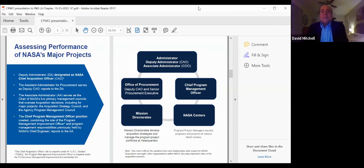For sure. And this is very early. It's before we've even necessarily gotten the full funding or anything like that. And there's early aspects of the project where you're just developing the idea. You might even just be in a lab developing a new capability. So of course you need schedules from the beginning. They're not as well formed. They may not be thousands of lines of network schedules or anything at this point, but you would certainly have a high level schedule in this discussion just to talk about, hey, we want to get from point A to Z, being launch and operations and so on, in this 5-year span. And here's how we're going to do that.